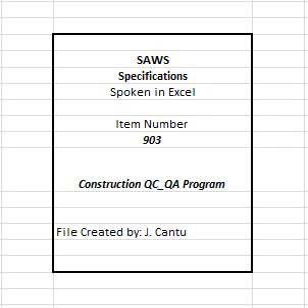C. Specify who will be performing all required testing and at what frequencies. D. ASTM D3740-96, minimum requirement for agencies engaged in the testing and/or inspection of soil and rock as used in engineering design and construction.